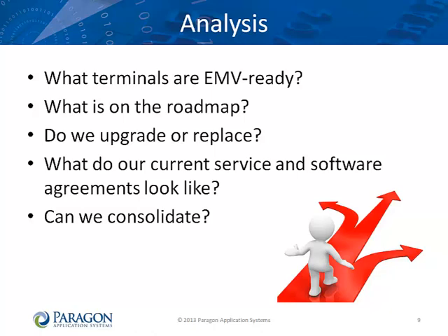Does your institution have any preferences for the makes or models of terminals that you support? Your institution may have been through mergers and acquisitions, so your terminals may be from many different vendors. Review the current service and software maintenance agreements. This may be an opportunity to consolidate brand and type, especially if you work with one vendor that you prefer over another. Fewer combinations of make, model, and software kernel mean fewer certifications to perform. Your vendor may also give you a price break if you have more of their terminals.